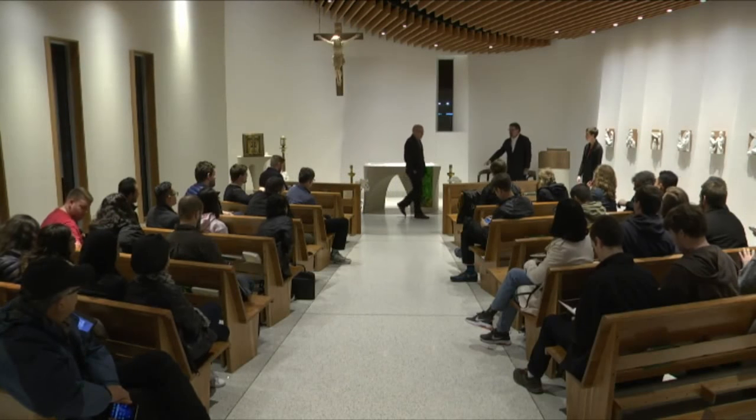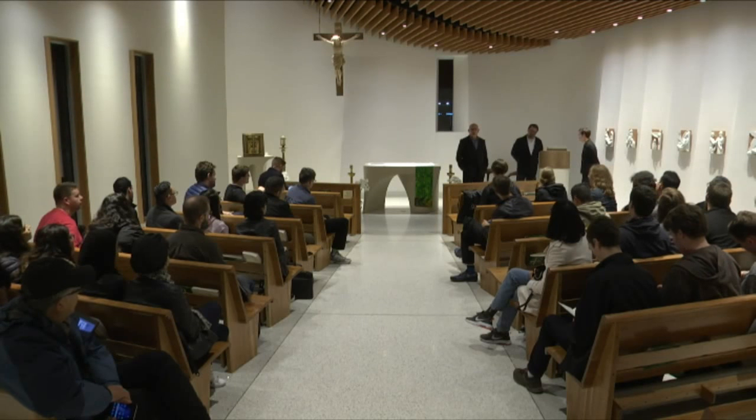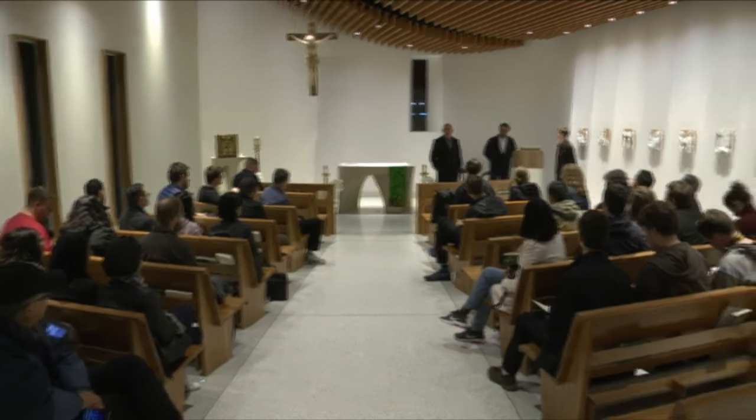One thing Craig neglected to acknowledge with the door is that the door was mostly fabricated by the time we realized that the hinge might not work. Oh, that's true. It's true. So we thought it was going to be the garage door for a while. Yeah. That is true. It was pretty much done. It's important to note though that that door was pretty much built. Yeah. Sitting in the shop.